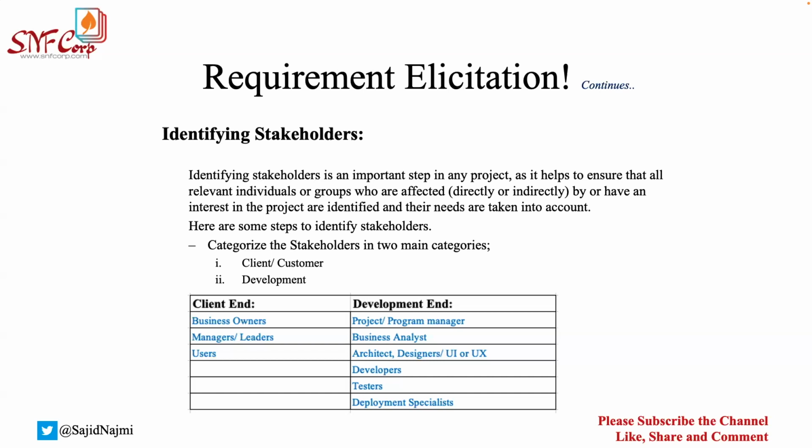By the time I'm delivering the project, getting it signed off from the business and the project is officially closed, I'm still not going to stop working on the stakeholder register. I continue revising it. Then when everything is done, I upload this document to business repositories as per the company's policies. The stakeholder register is not your personal belonging, it is your company's. They own it, so you have to give it to them so that any new manager or new team members working on a similar project can use all those documents.